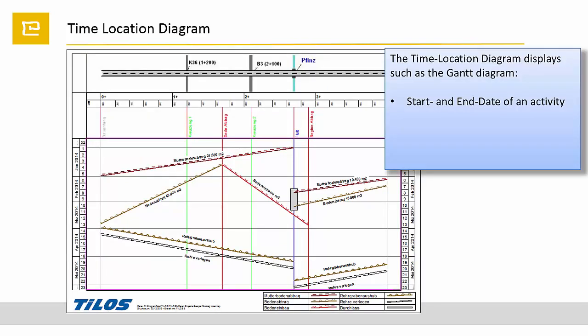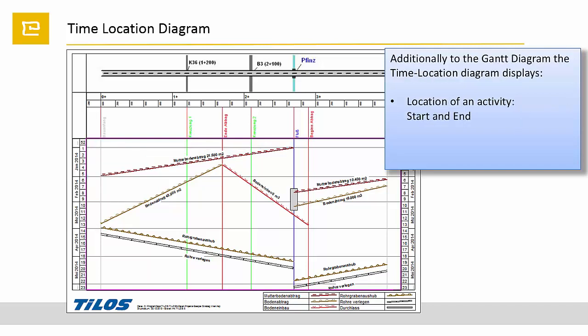So what is the information displayed on a time-location diagram? Such as the Gantt diagram, it displays start and end date and the duration of an activity. Additionally, it displays start and end location and the length of the activity.